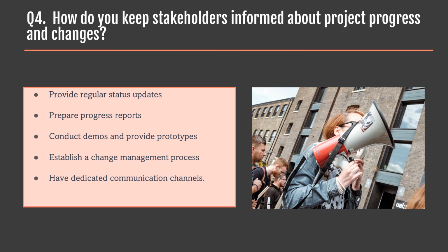She provided prototypes of the mobile application and did a demo which assisted the stakeholders to visualize the progress made and the functionality of the application. Mary solicited her feedback during these sessions to ensure alignment with Jane's expectations. She established a change management process which clearly communicated the process to the stakeholders, including how changes could be requested, evaluated, and approved. She informed Jane promptly about any approved changes and their impact on the project.